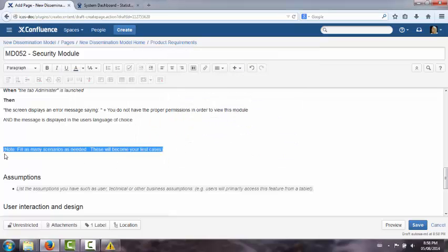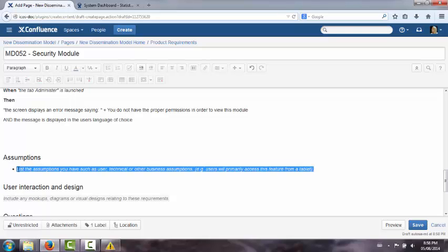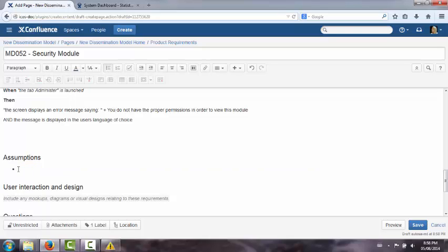So then you would move on to the assumptions. So let's say the assumptions is that we will use the LDAP technology provided by the web service from StatsCan. So essentially you list any assumptions where you move forward with your feature sheets. And your estimates will be tied to the assumptions that you made in your feature sheet. So let's say the assumptions change, then your estimates need to be revised accordingly.